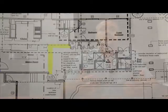So what we'll do is create owner's responsibility sheets that we give to the owner after we're done going through the whole project to see all the custom stuff that's involved in it. We'll create that owner's responsibility sheet and give that to you so that you can pick out all your finishes so that we have that before it's time to build. And if you do have that, we know exactly when we need to order the material, put it on our time schedule, when it needs to be picked out, when it needs to be delivered to the job, so we can keep your project on time.